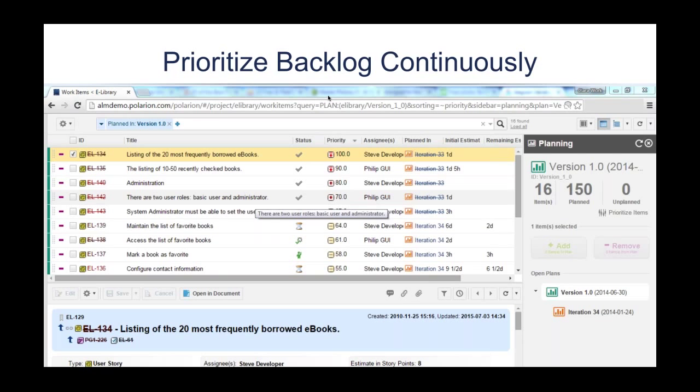The backlog is usually ordered into a sequence based on considerations like business value, time needed, risk, and of course, the strategy. These priorities usually change continuously because the business environment changes continuously. So you should be able to review this backlog and adapt these priorities regularly.